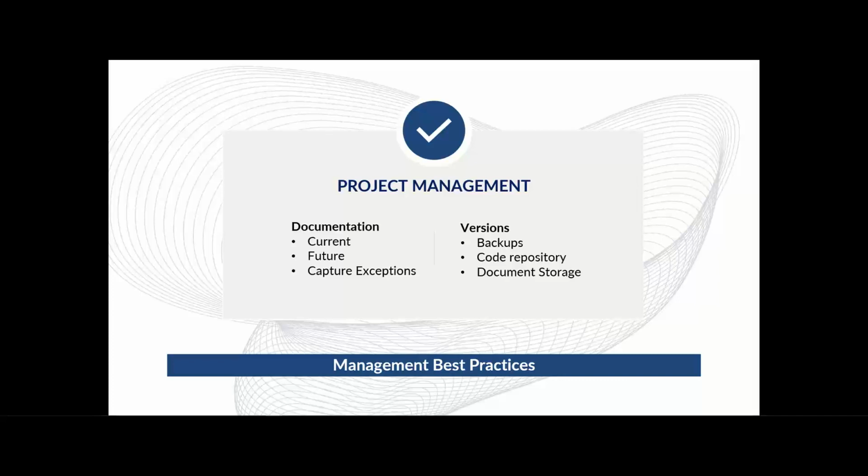Now, we talked about what you should document, but documentation is no use to anyone if it can't be found. We recently had a customer who lost a resource to another company, and this person had been with the company for over 25 years. He walked out of the door with a vast amount of institutional knowledge, and no one took it upon themselves to archive any of his documents from his network share.